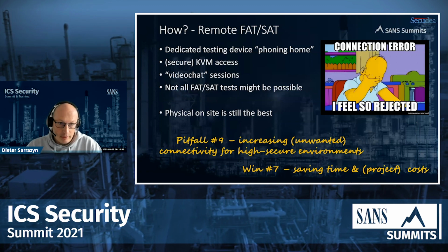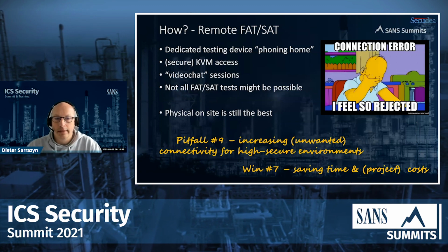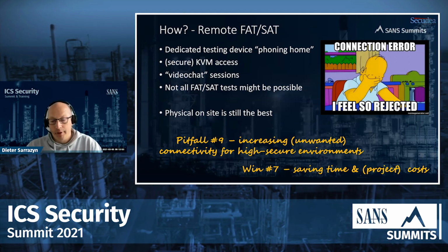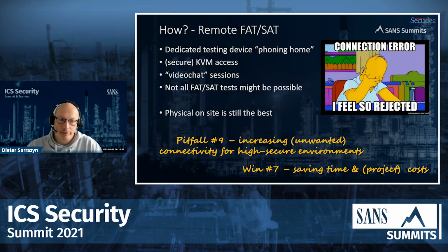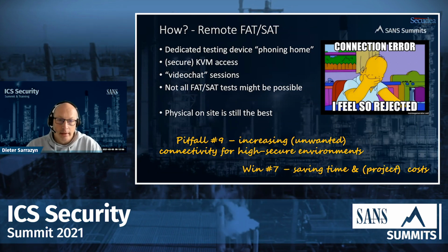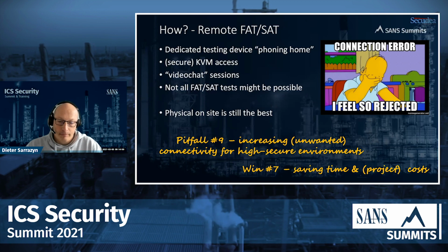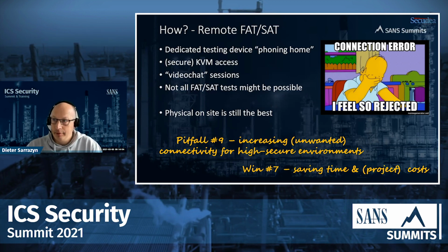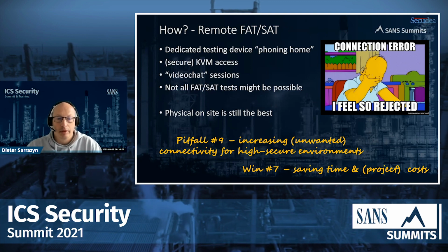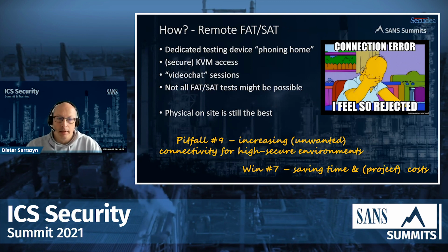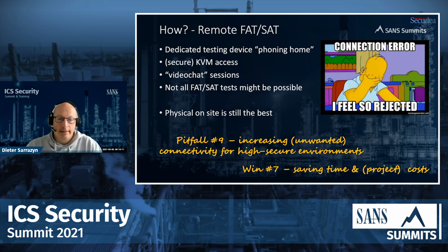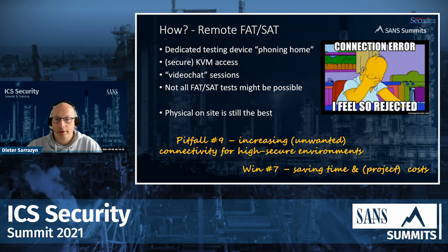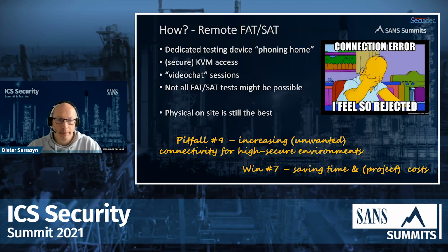Then, of course, we entered the remote FATSAT era in the last year. Remote FATSAT can be done because of pandemic reasons, of course, but also due to economic reasons. I know there's debate ongoing on how you can do it. I know there's another presentation coming up talking about this particular issue. But remote FATSAT testing exercises can be done using a dedicated testing device that phones home to the tester's system or environment.